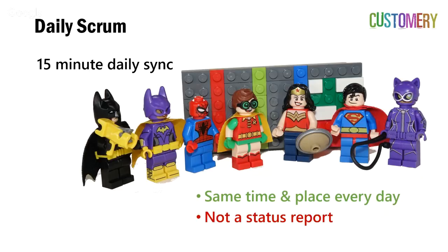And it's the Scrum Master's job to go away and try and knock over those impediments. I find that by focusing on what we achieved yesterday, rather than what we did yesterday, people describe the work that they've done in order to try and meet the sprint goal. If we say, what did you do yesterday? People say, oh, I was in a design meeting and I had a workshop with the product owner. Well, that's interesting, but that wasn't really going to advance us towards the sprint goal. So by focusing on what we achieved, we tend to discuss the features that we implemented yesterday and the features that we're going to work on today.